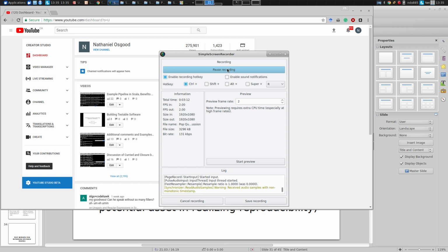Okay, 4 types of documents other than code in which peer reviews can fruitfully be conducted. What's something other than code you might review in a peer review session? Requirements doc. Good. Another thing? Test matrix. Test matrix. Excellent. Design documents. Design documents. Good. So sort of the architectural design or specifications of the interfaces for the classes which will be used. So Class A knows what, the person writing Class A knows what methods will be available in Class B and basically what they do. Okay?